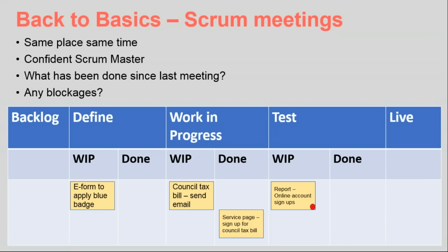One big pointer I would say though is keep asking your staff about how you could improve the meetings or what could be changed. One key change we made based on that group feedback was the decision actually to move from every day to holding meetings twice a week. And by having that open floor discussion, we were able to quickly come to a consensus. So that is another bonus to having those group meetings.